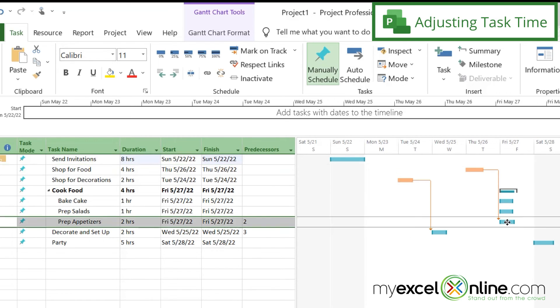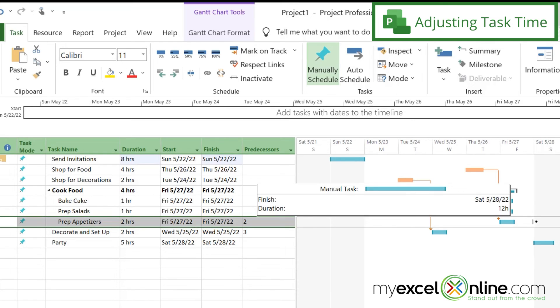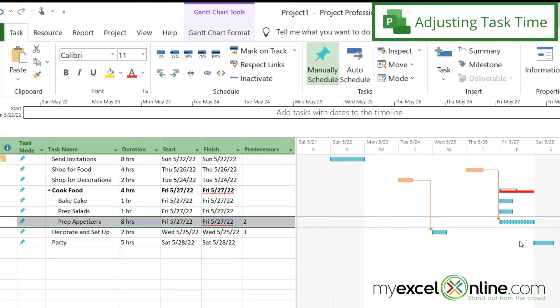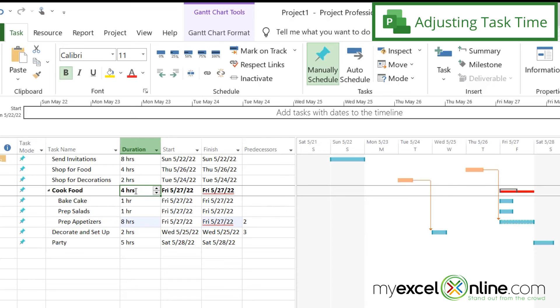If I were to do the same over here for the summary task, you can see that I'm going to get an error because that summary task has exceeded the time that I have set for the duration for the main task. So if I went up here and I changed this to eight hours, you can see that that error has gone away.